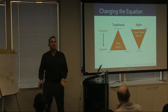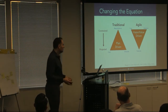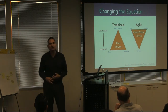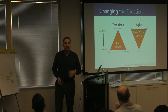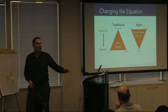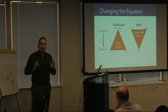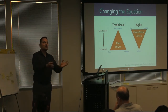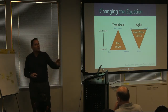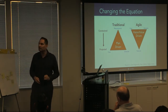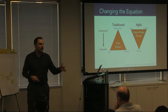The problem is we make estimates at a time when we know very little about what the project is actually about, which is why estimates tend to be somewhere between bad and horrendous. The Agile answer is to flip things around: set aside a certain amount of money and time, start from a goal or vision, and use that budget to build the most important things that get us closer to that goal. We can't tell you exactly what you'll get for that money, but we can promise we'll build the most valuable things first.